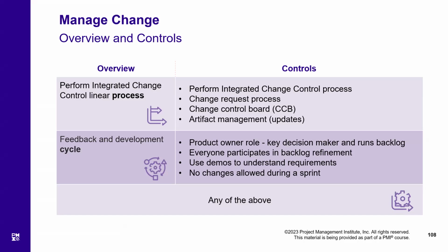And all the change requests held so far by integrated change control will be presented in front of the change control board, and they will either accept them or reject them. If they accept them, then the requisite changes are to be made in the respective plans, and the whole of the project management plan may get amended as a result of the approval of a change request.